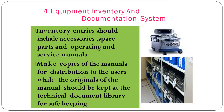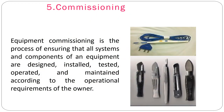The fifth component is commissioning of the equipment. It is a process to ensure that all systems and components of an equipment are designed, installed, tested, operated, and maintained according to the operational requirements of the owner. Only after commissioning will the equipment be allowed to be used for patient service.